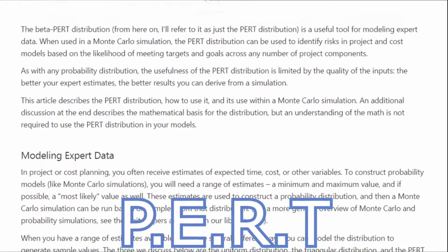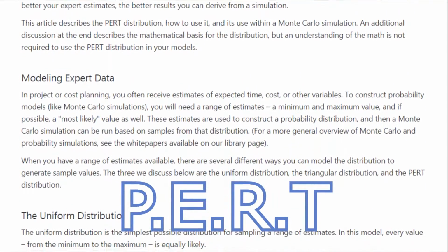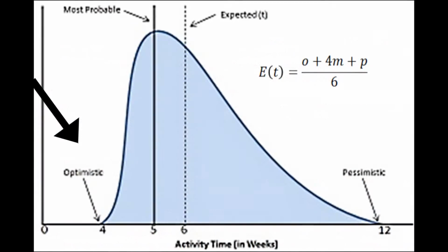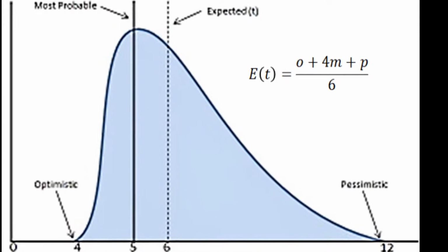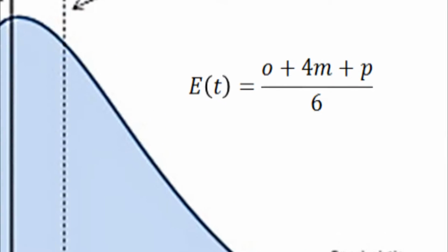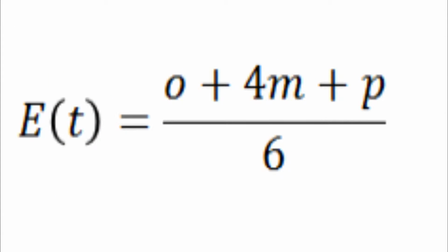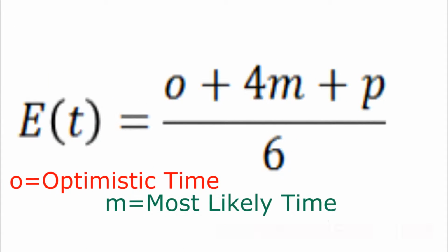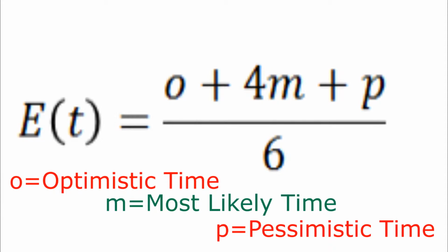The program evaluation and review technique is a method used to estimate the duration of projects. The value of the optimistic, most likely, and pessimistic times are used, instead of just a single duration time. This is the equation used, with the most likely time weighted higher than the other durations. This helps to shift time estimates away from more unrealistic limits. This will provide a more accurate method of performing critical path analysis.